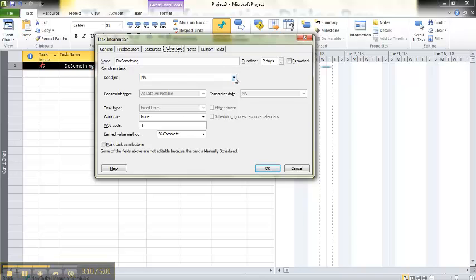So you can add deadlines, okay, and there's a constraint type. So since I had said that I want this project to schedule by finish date, every task is going to start as late as possible. Still in time to get done, but as late as possible. If I would have said schedule by start date, my constraint type would be to schedule a task as soon as possible.